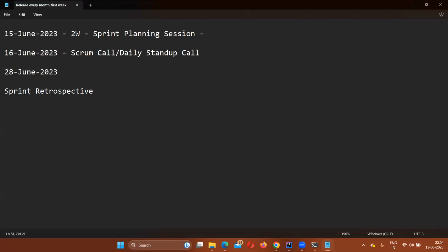The scrum master will take each and every one of your scrum team's names and ask, okay folks, what did you do? He'll simply highlight your work, saying that you were given this many backlog items in the previous 1 or 2 sprints, you were able to complete this many, and you have this many pending tasks. He'll ask what went good in the previous sprints, what went bad. It's sort of a feedback session. So what can we do to improve the sprint performance?